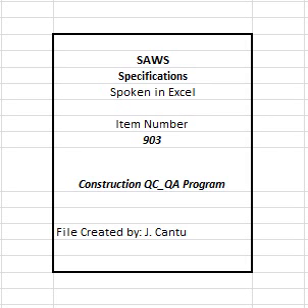The plan must be comprehensive, detailed, and logical if the contractor's quality control system is to be effective. One objective: the contractor has the contractual responsibility to manage construction quality and inspect the work. Control is an ongoing system of planning future activities. Inspection is the process by which ongoing and completed work is reviewed. The objectives of QC are to see that the contractor has adequately planned to begin a phase of work, to eliminate deficiencies, and to follow through in accomplishing the work in accordance with the contract documents.